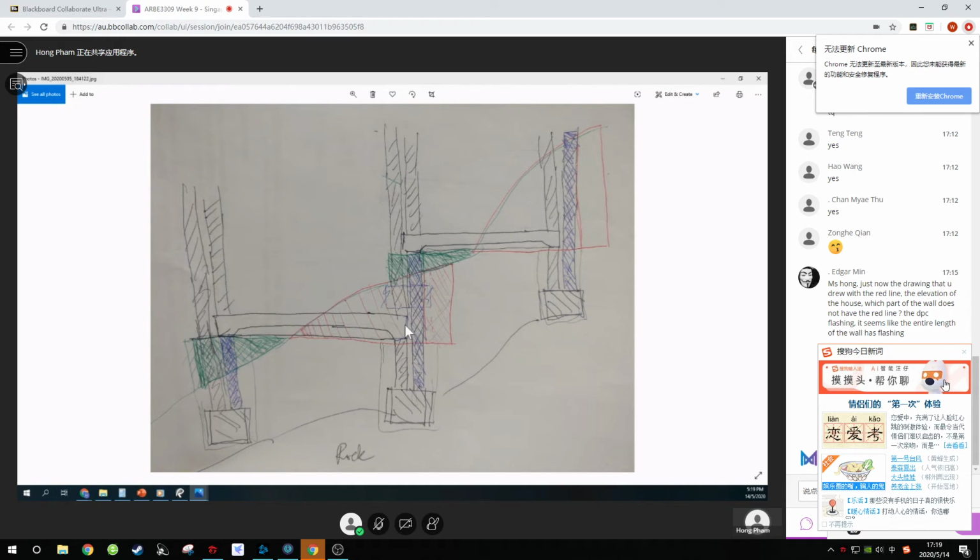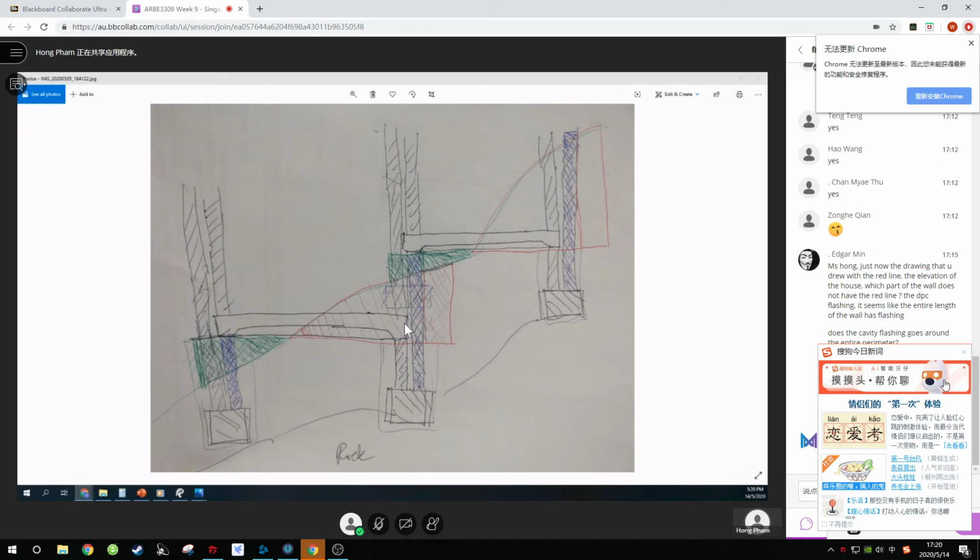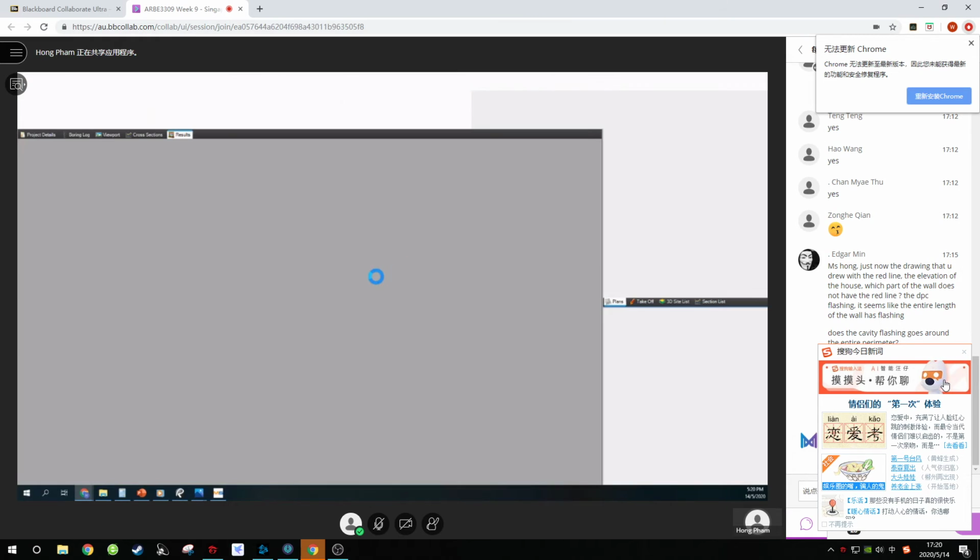And the retaining wall, you have a working space. Like previously, how I illustrated under my mud shark. Or else, you can just ignore the retaining wall and brick wall, but you make a very big slab to represent both of them. Remember, because our whole point is we need to excavate a space to fit in both the brick wall, the retaining wall, and also the slab. So you shouldn't have just one side of the retaining walls. If you got wall, you must have both sides are walls. Okay?